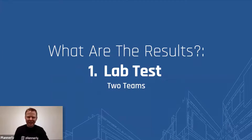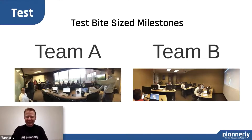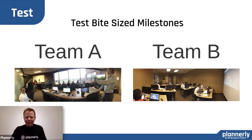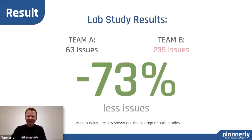We had a couple of case studies — very quick. One was a lab study with two teams, Team A and Team B. They went through two exercises: one running a traditional process and then evaluating issues afterwards, and the second where they had a communication about sequencing and then ran in mini phases. It was astonishing — we saw a 73% reduction in the number of challenges and issues that needed to be resolved. That was a big aha moment.